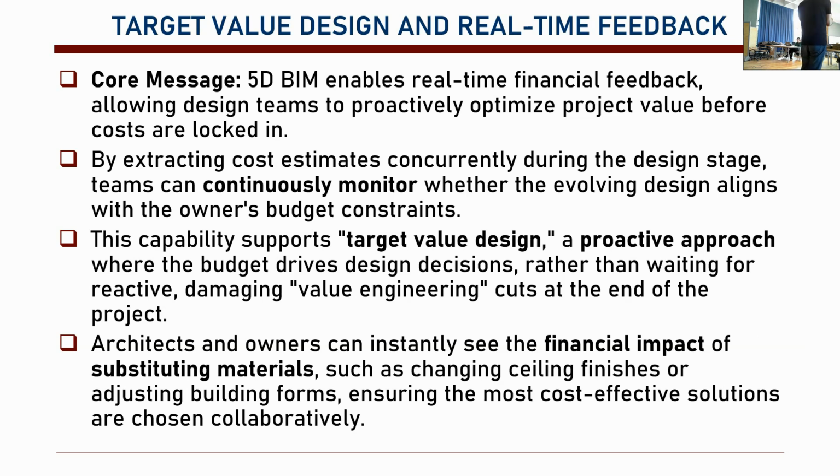Do you want to cut the size? Do you want to cut the luxury level? Do you want to cut the height, for instance, in the spaces? What is it, and how does it impact you? You make these decisions at the early stages. If you make these decisions at the later stages, you cannot change the size. You cannot change the height. You only have to cut down on the luxury part.